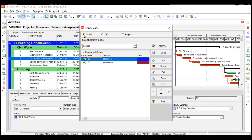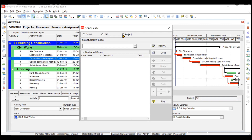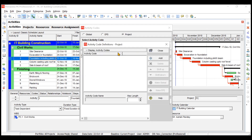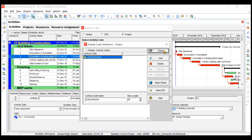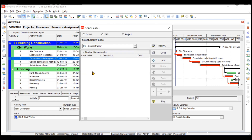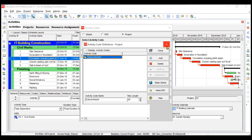Let's go project-level since we likely won't apply this to other projects. We need to click Modify. Since there are no activity codes yet, we need to add one. We can name the activity code 'Subcontractor'. We can change the maximum length to, let's say, 20. This maximum length refers to the name of the activity code values. Then we can simply close this window.